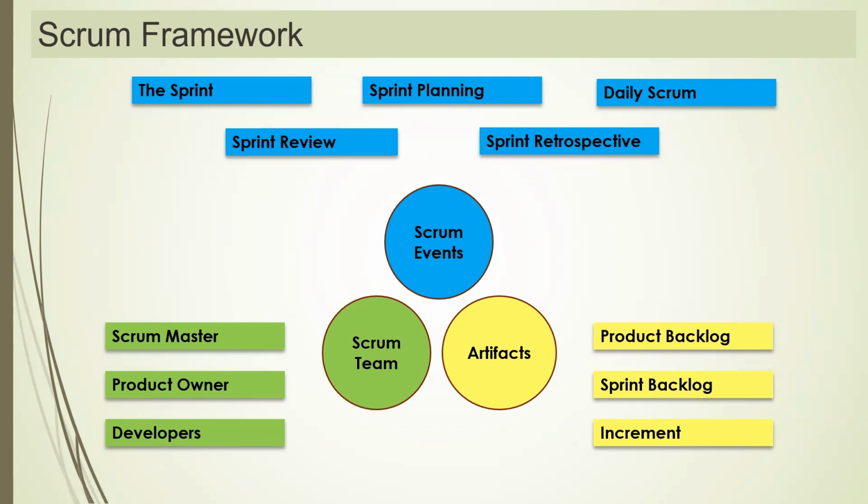It's a daily 15-minute meeting, where we just ask the developer, what you have done yesterday, what you are doing today, and if there is any issue where you need help, that's it. If he has any issue, we just have to make a note of it. In the call, we don't discuss the issue, because if you start discussing it, it will take time from other people in the call, and they will keep waiting until we complete the discussion. That will be a waste of time for them. So the solution has to be done later.